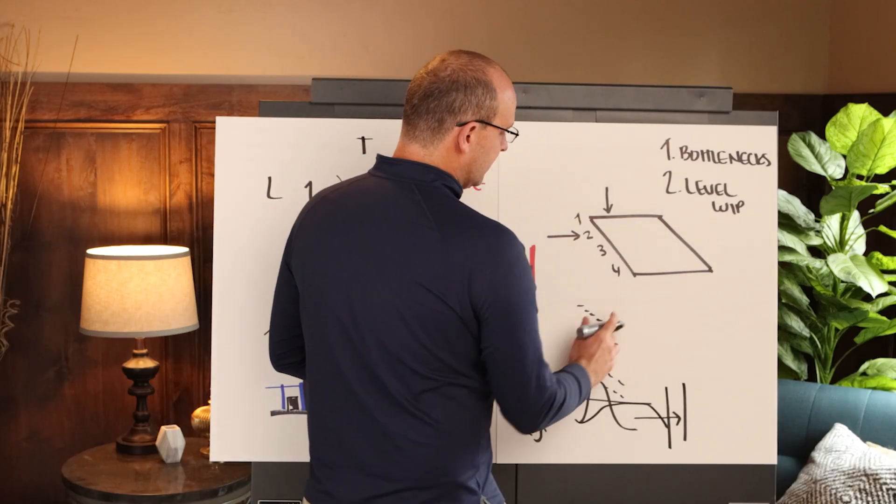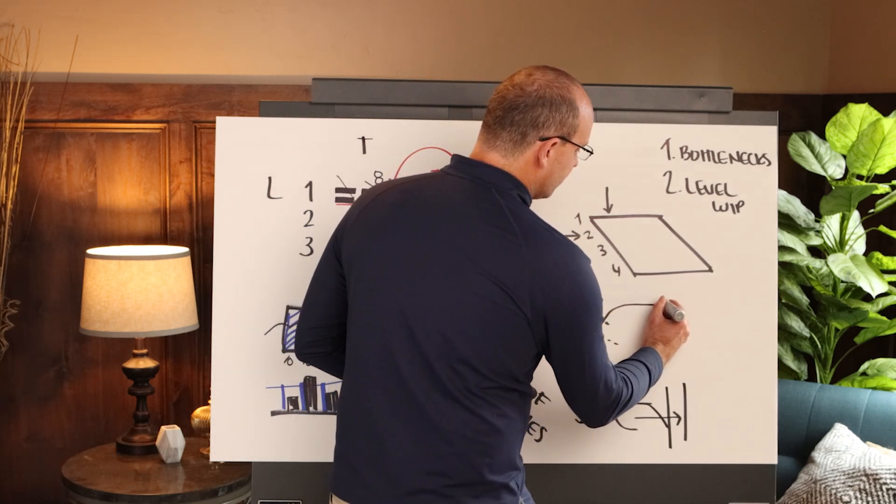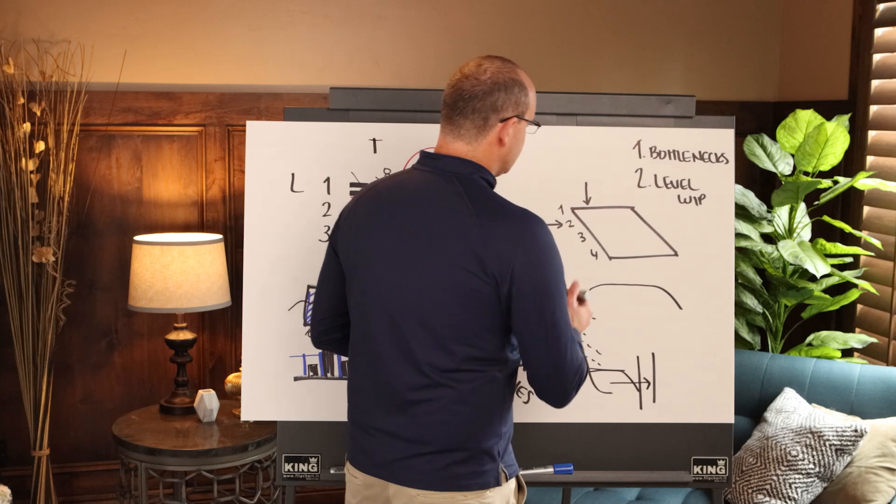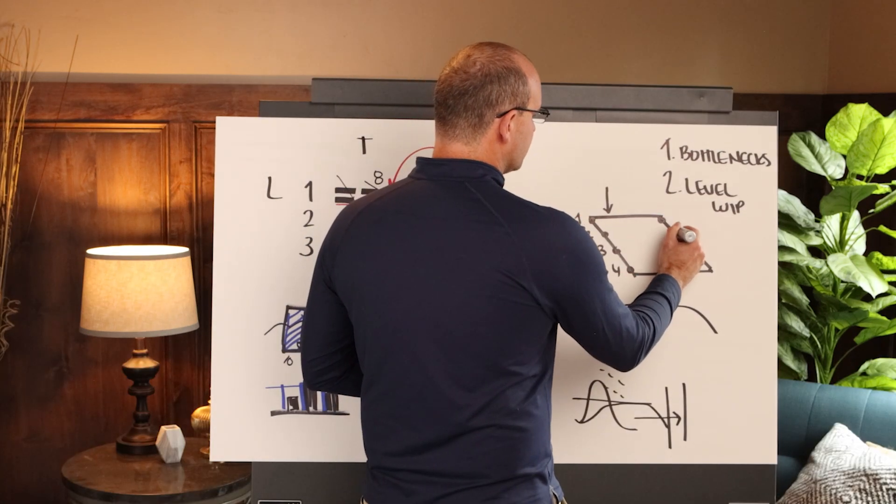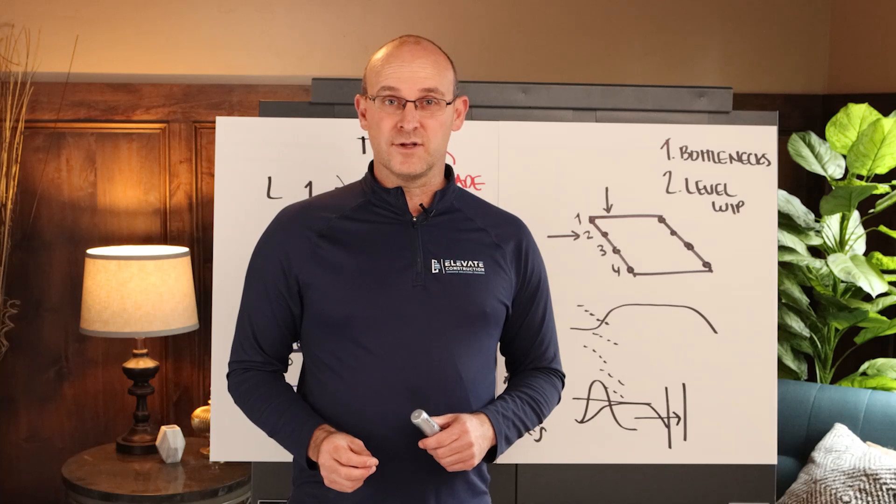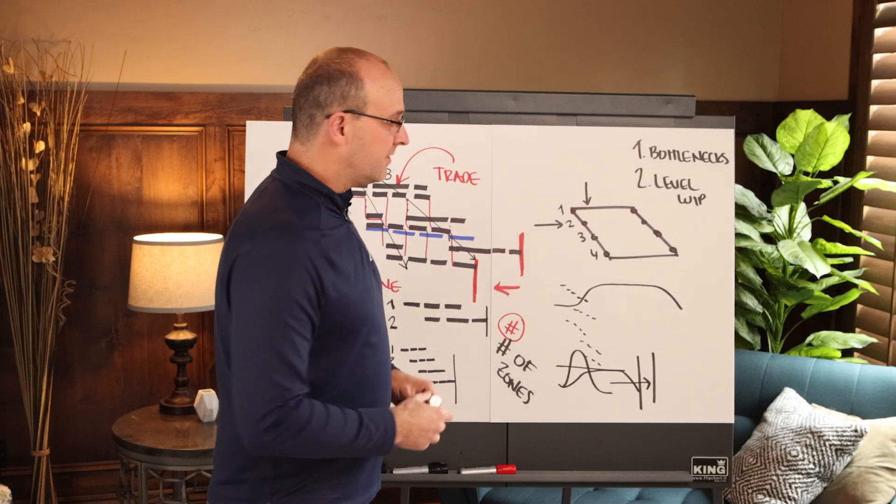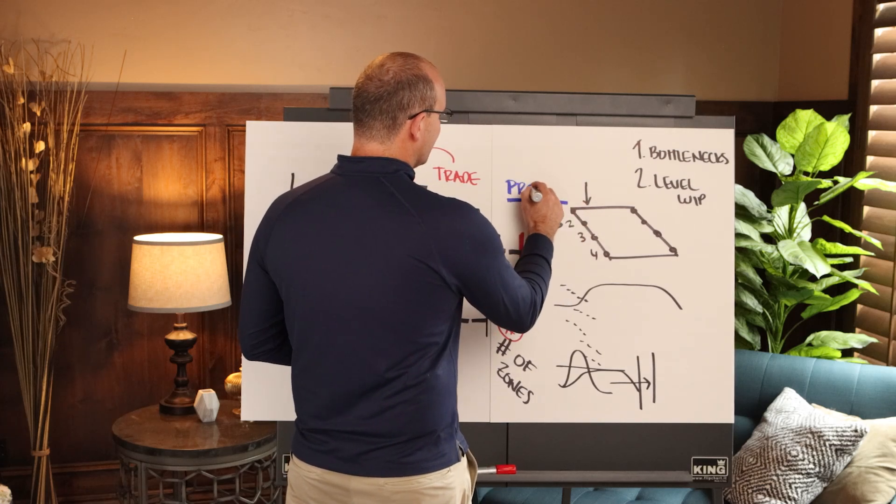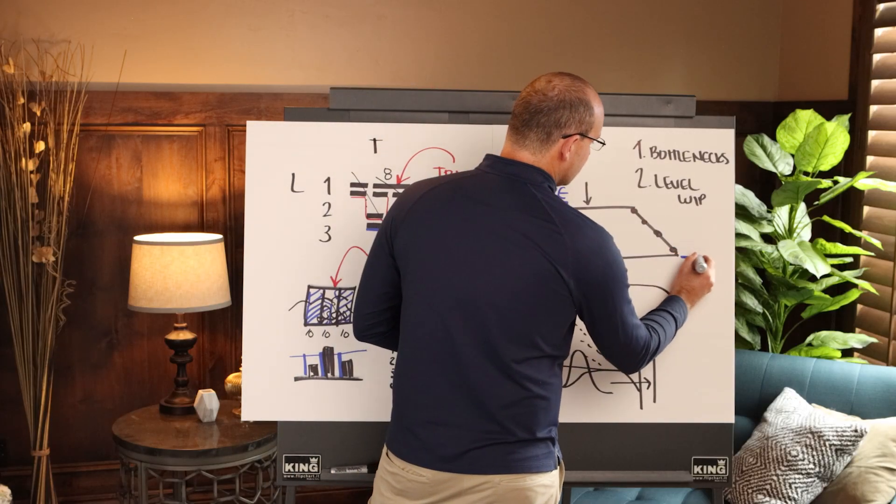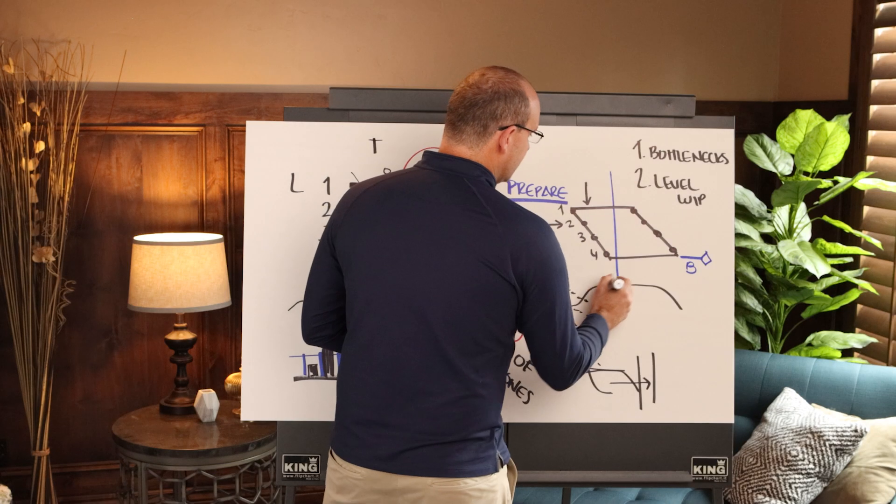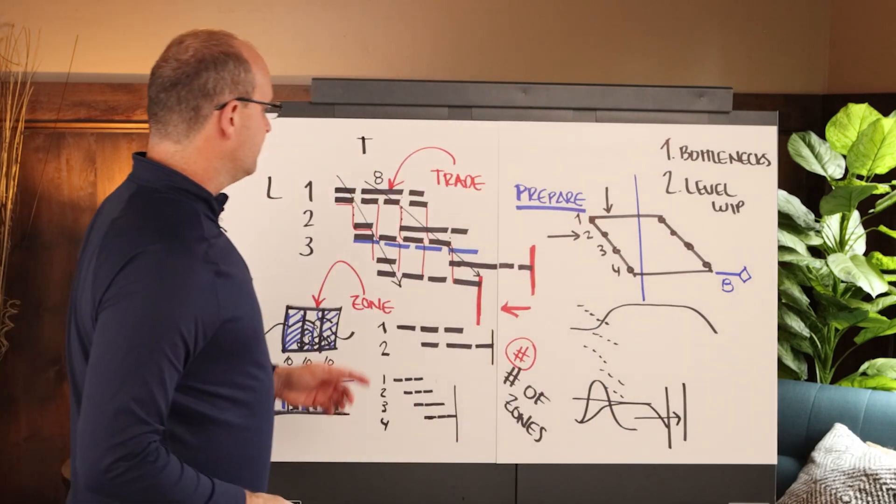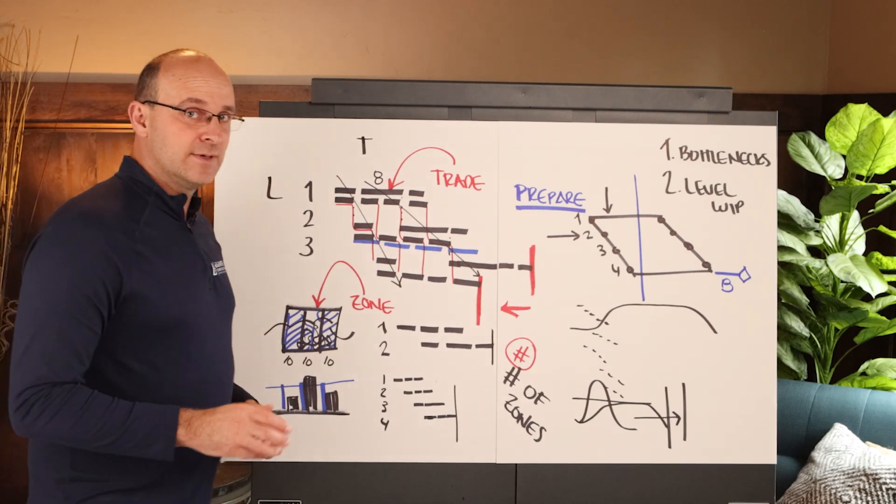So when you're in the tact production system, if I was going to do a histogram of this, it would look like this. Workers coming on site, beautifully leveled, and then going away. So in a tact production system, you'll always level your work in process, which will keep you safe. The other thing with your tact plan is not only do you know when to start, but you also know when you are to finish, which means that you can punch and finish as you go and make sure that you're finishing the product real time in what's called one process flow. And the last thing that I want to say, I don't want to make the video too long, but this provides a framework for you to actually prepare the phase, which we also talk about in other videos on this channel. If you're not getting my message, this is a cool channel. Anyway, so you're able to prepare the work and also identify buffers in the system so that everything in here can be stable as you do your work. It's really, really quite genius. Now, the reason I told you the base components of all of these parts, meaning how to just go ahead and map out the trades, how to look at the zones and how to analyze the zones is because there's a key point in here.